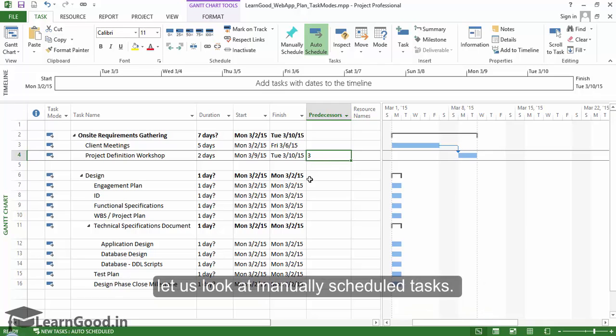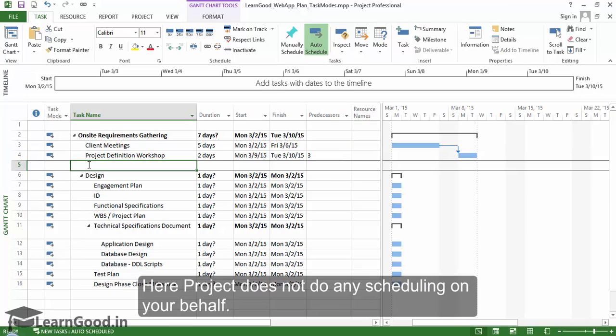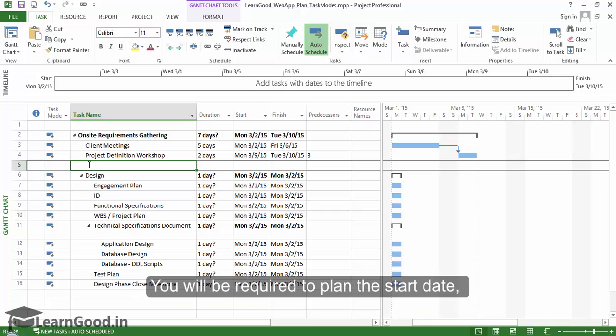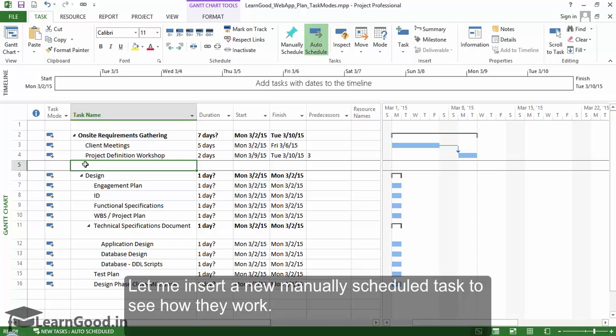Here Project does not do any scheduling on your behalf. You will be required to plan the start date, duration, and end date yourself. Let me insert a manually scheduled task to see how they work.